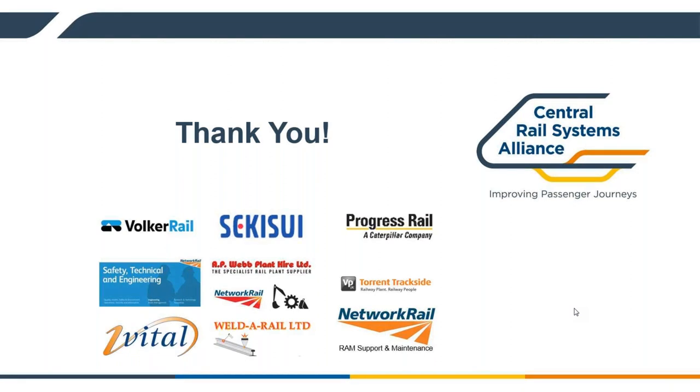And the other thing is, I think the problem with greenheart timber, which was something we were trying to potentially look at in the first place, it's not FSC certified anymore. Therefore, we couldn't actually obtain it through the services. It's against their policy. So there's a couple of areas where it was considered to go for something a bit more sustainable, and you could argue whether you think it's environmentally friendly or not, because of the way the FFU is manufactured and made in terms of the sort of carbon footprint, that type of thing. But it's obviously got more benefits than just going back to the same greenheart timber.